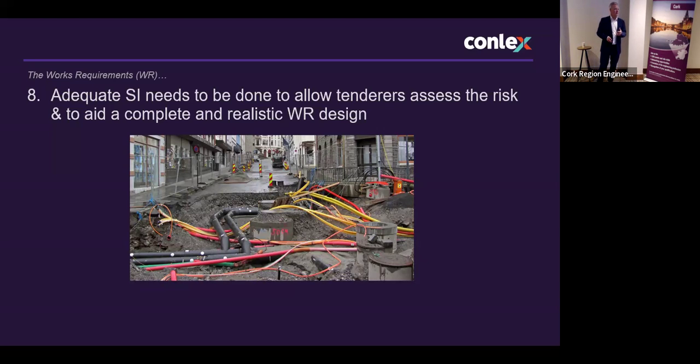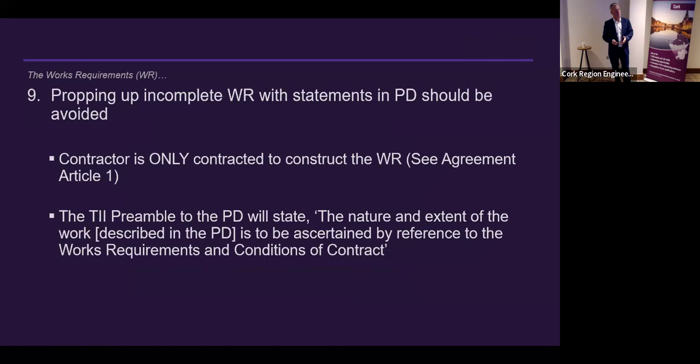If it's next to impossible or very difficult to construct what you've designed because of what's in the ground, again, maybe an enabling works package might be a good idea. Isolate it out, get it done under a different procurement method or whatever, but lumping it into a fixed price lump sum contract isn't the way to go, because you'll have an incomplete design, you'll have clashes, etc., etc., etc. So again, have a think about that particular issue.